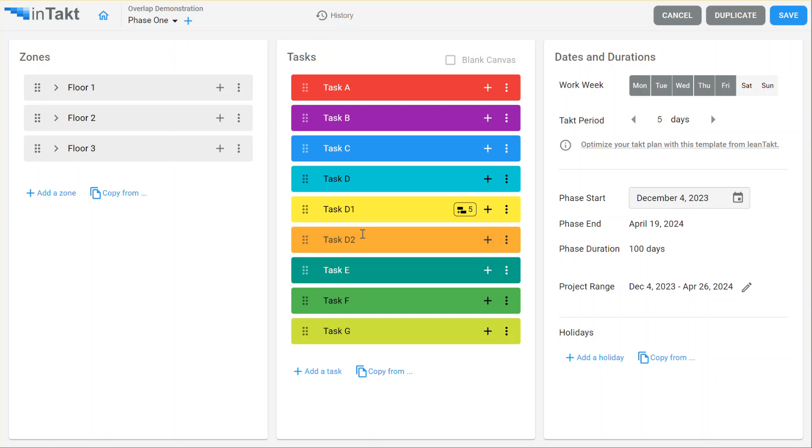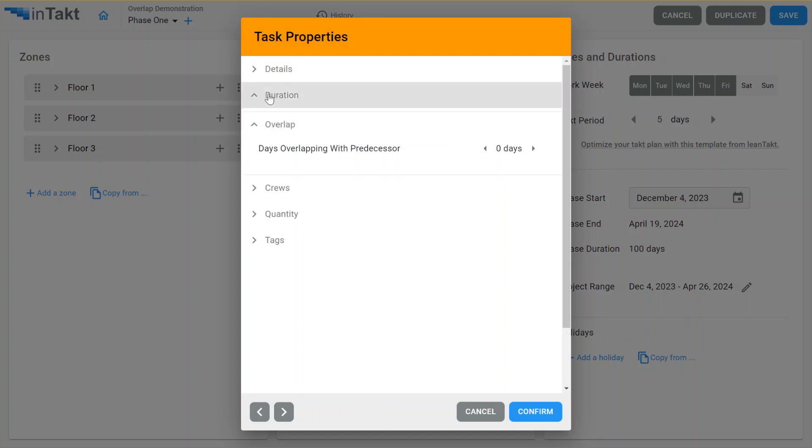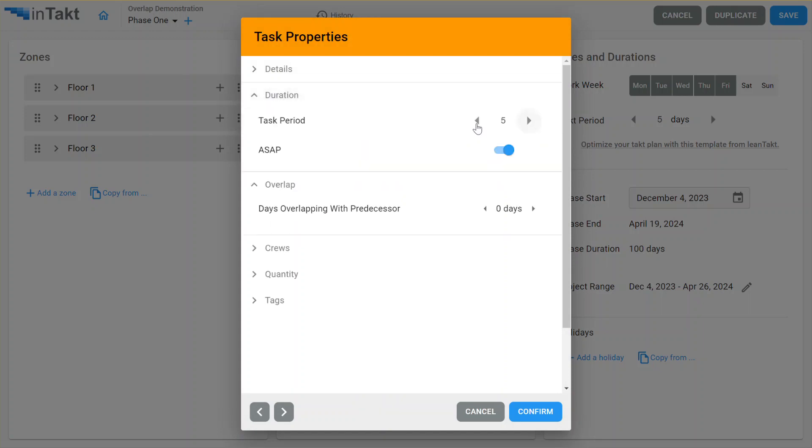So we have a five-day tact period there. But let's say task D2. We want it to be a shorter task. Maybe this is a three-day task. And we'll overlap this one by three days.